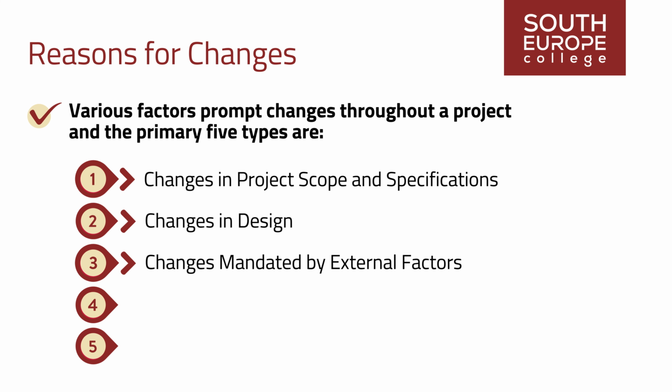Changes mandated by external factors. Government codes, labor contracts, supplier requirements, community considerations, or other environmental factors may compel alterations to the project plan. Changes for improved project return. Changes that aim to enhance the project's rate of return, a challenging aspect to estimate, should be referred to upper management for decisions.